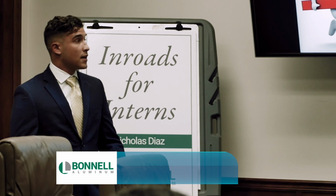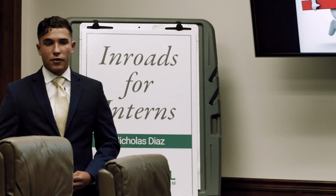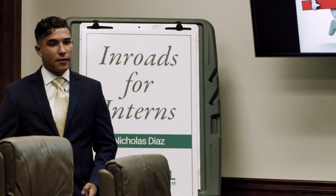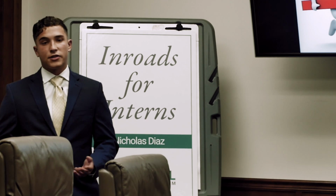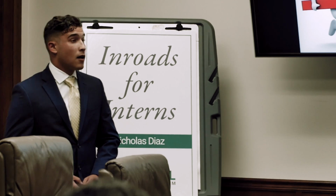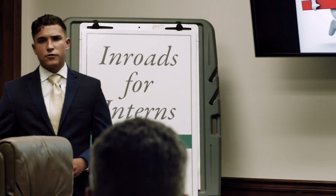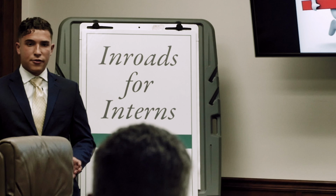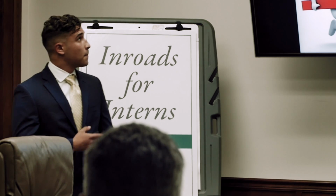And our final part of that is the lift assist, which we have quotes for. We have to get that approved and ordered, and there'll probably be about a 10-week lead time going forward. Then hopefully that gets implemented and we can fully have our ideal state for that cell. We'd update the SOP for it and everything, and then we go into our control phase, which would be to monitor the process, make sure that it's staying within those bounds that we've established.